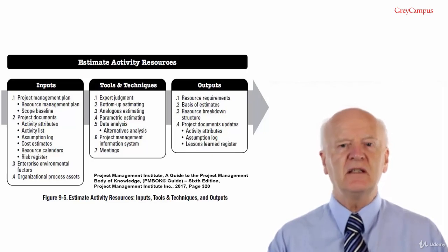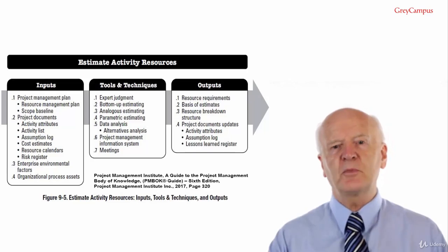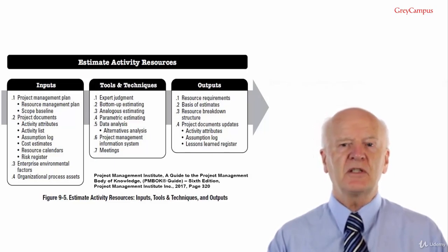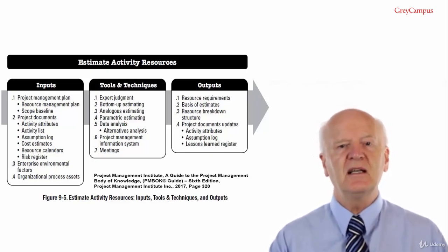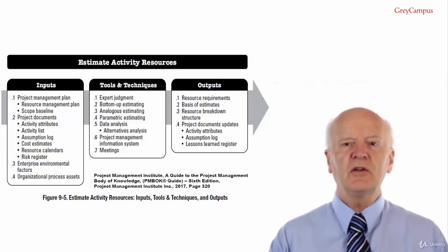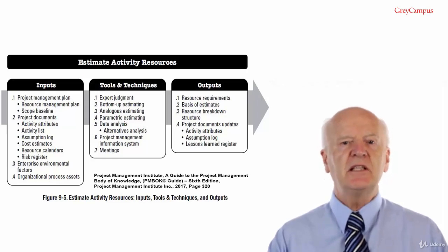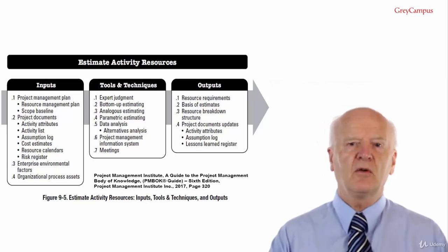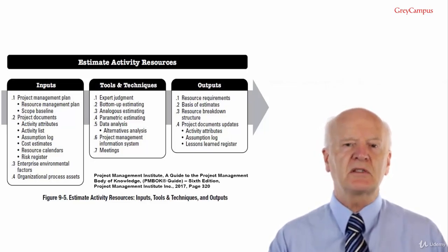A technique used in this process includes alternatives analysis, which can be used to evaluate identified options in order to select the options or approaches to use as the best solution to perform the project activities within the defined constraints. Many activities have multiple options for accomplishment. They include using various levels of resource, capability or skills, different sizes or types of machines, different tools, manual versus automated, and rent, make or buy decisions regarding the resources.